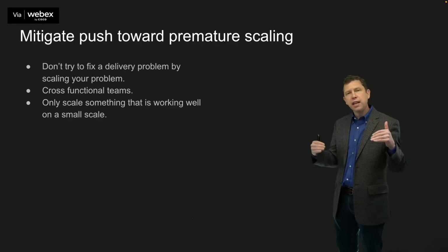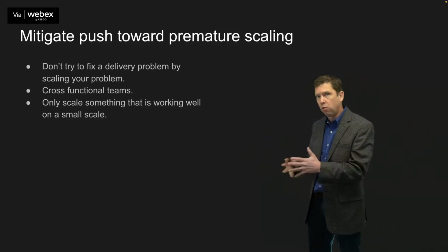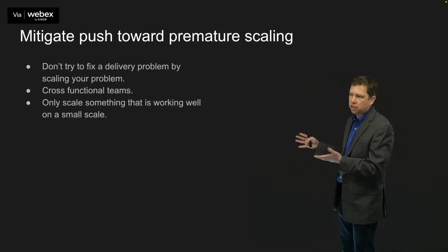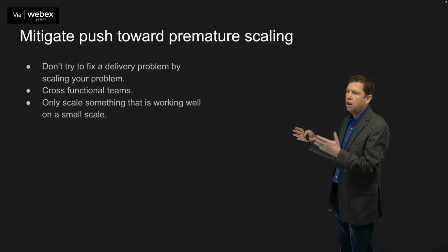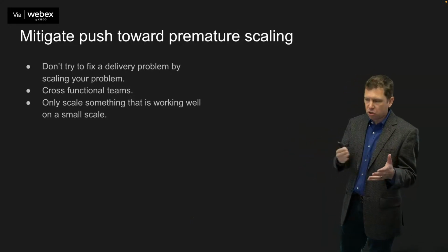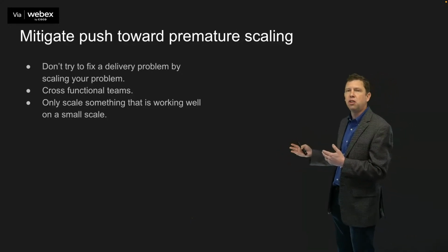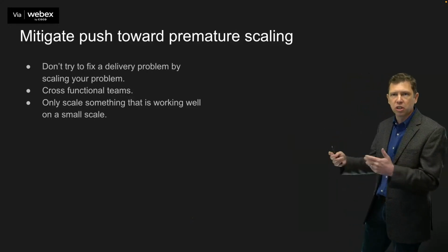You may be able to take a little bit of a hit to efficiency just because you can have more stuff happening at one time. The total cost in man hours of delivering something with 50 people may be, or often is, going to be more than with 5 people just working their way through it. But that might be a reasonable exchange if it costs us a little bit more, but we're able to deliver 5 years sooner than we could with just a small team.